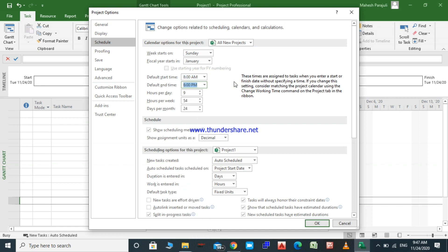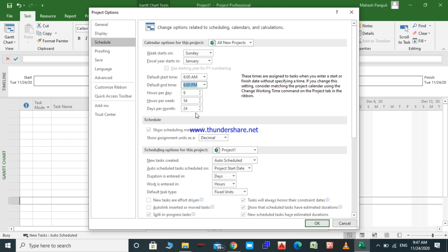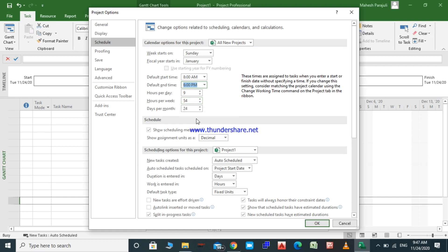With one hour for lunch break, that gives us a total of nine hours per day. So hours per week will be 54. There are six working days in one week and nine hours a day, so hours per week is 54 and the number of days per month is 24.